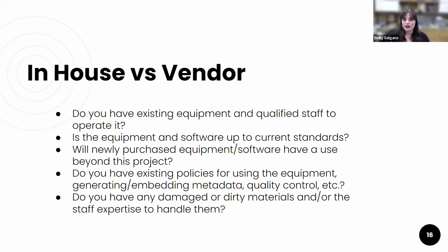So there were always people who were able to do the work without all of the competing tasks that come up with other duties as assigned from the regular, full-time staff that worked there. And because there were already people always able to do the work and equipment that was able to do the work, there was no need to coordinate shipping logistics for such a huge collection. The purchased scanner would be used for plenty of other projects, both before, during, and after the Alumni Files project. So overall, that project made way more sense to do in-house than to ship out to a vendor. So it's really important to assess all of the different aspects of your project and decide: are you going to work with an external vendor, or can you do the work in-house?